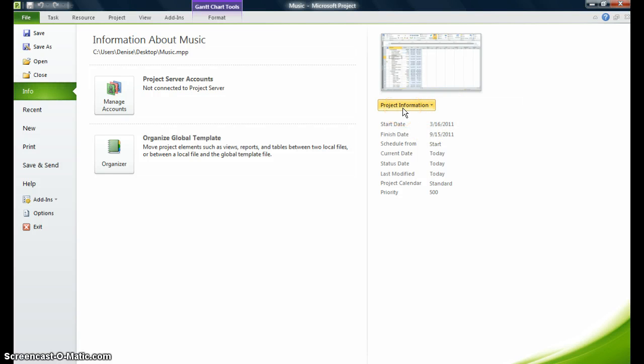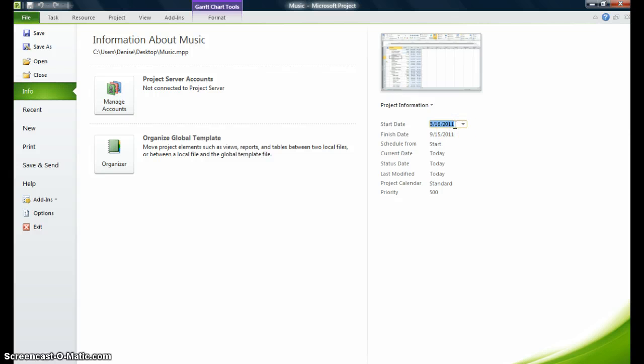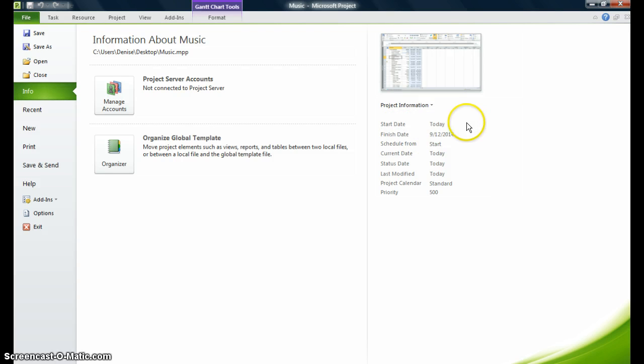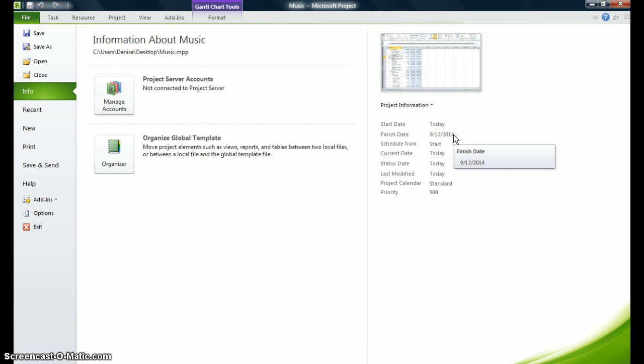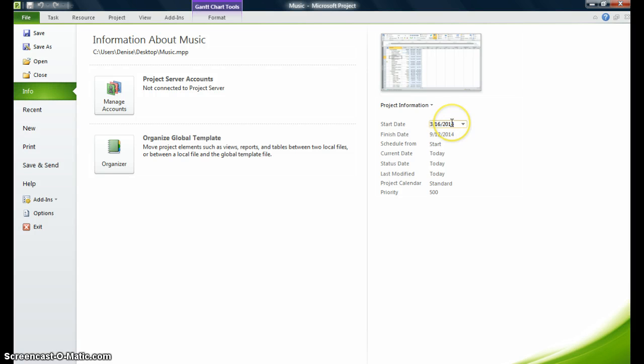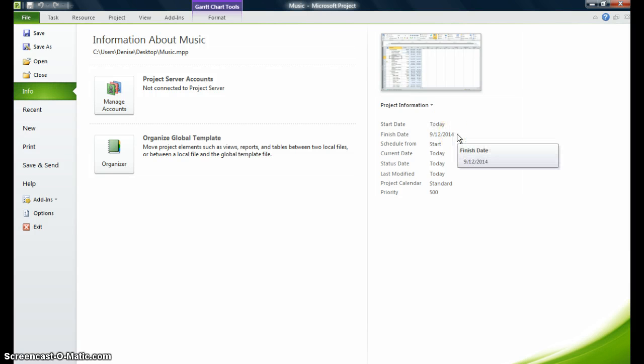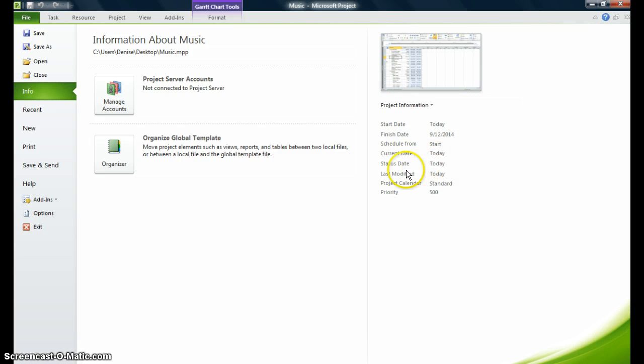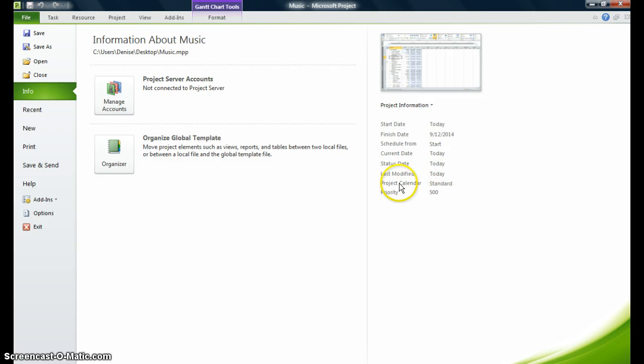And I'm going to go back to my backstage view and I'm going to go over here where it says project information. I'm looking at my start date. You know that I changed the start time to 3-16-11. I'm going to change it back to 14. And I want the start date to start today, which is a Sunday. I don't have to populate the finish date because in project you're either going to populate the start date or the finish date. I want this project to schedule from the start date, so I'm just putting in the start date. The current date is today. The status date is today. The last modified is today.